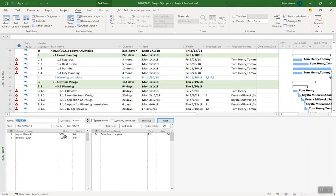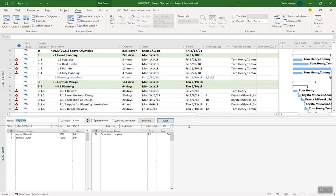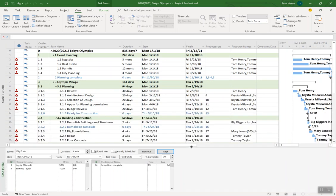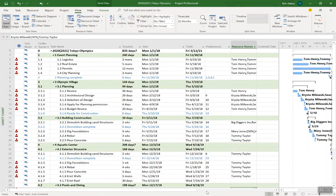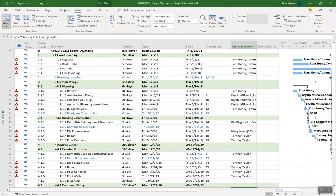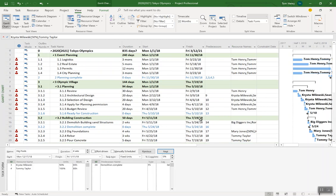You can get full access to their assignment planning variables, the duration, the units and how many hours of work. When that task is effort driven essentially it locks the work for that task and you can adjust the task type. That's a whole other topic there. But that's another way. Once you finish that, just drag it down. If you want to bring it back, drag it up like so. You can also access that from the view ribbon.